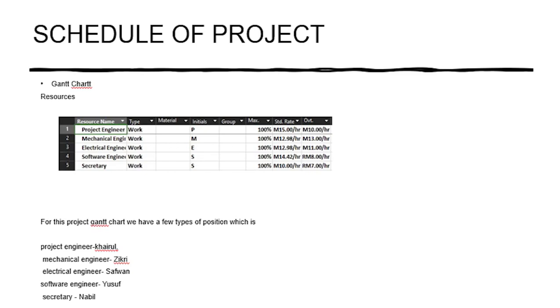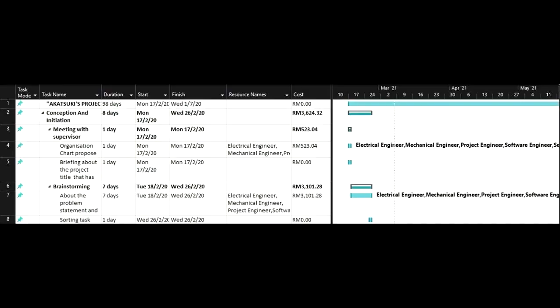This is our Gantt chart. First is the resources. In this resources we have about five people who have their own position based on their skill. Next for the first phase we have a conception and initial process. In this process it takes about eight days to complete all the subtasks. The first thing that we did is a meetup to make a group of five people and organize the position in the team based on individual skill. After that have a briefing to acknowledge the theme of the project so we can come up with the problem statement and our objective. All the problems are solved by having a brainstorming with each other. This phase needs to be done precisely to avoid unnecessary things in the middle of the process.